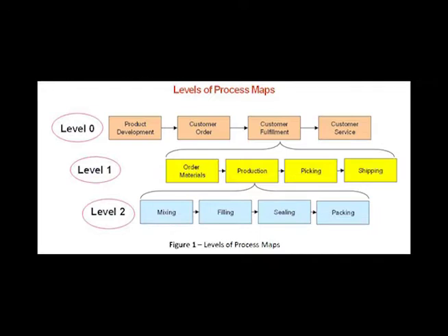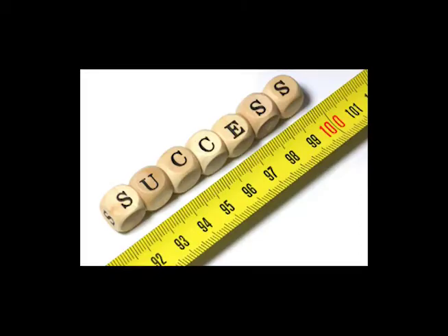Defining both the problem and the process correctly is critical for setting the team in the right direction for the entire project. Measure. The problem and current process must be quantified. Measurements need to be defined and, if needed, created. This is done to create a baseline. This baseline can then be used to measure the impact the new project has on improving the problem. Measurement is needed throughout the entire life of the project to make sure the project is on track.